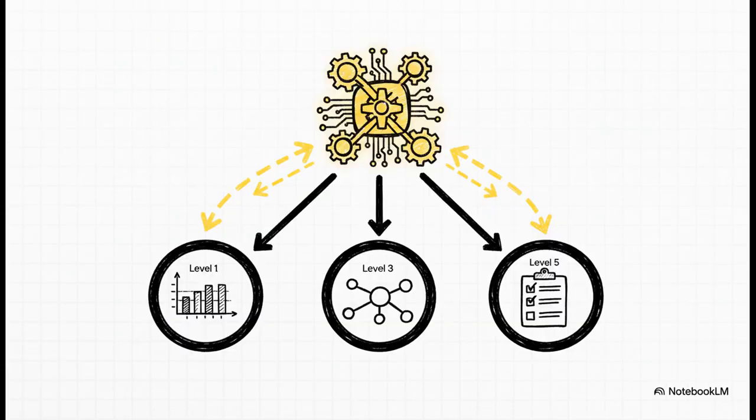And that's the whole magic of it, really. It's one project, one master plan, just with many different views. So when a daily task at level 5 gets checked off as complete, that information automatically rolls up into the project manager's level 3 view, and that in turn updates the executive's level 1 summary. See? Everything is connected. It's a single source of truth.